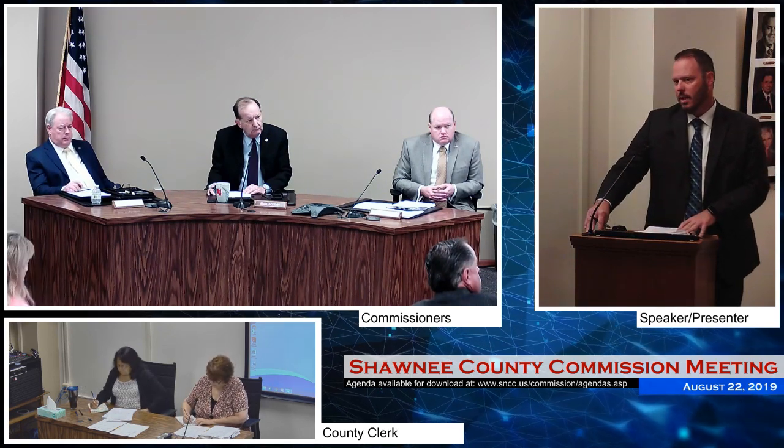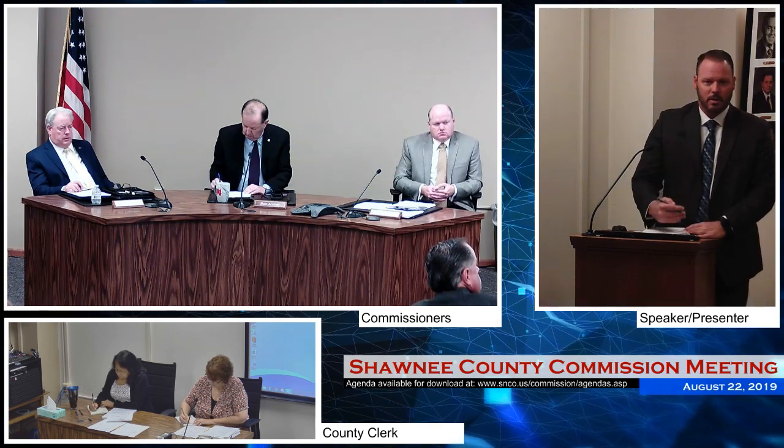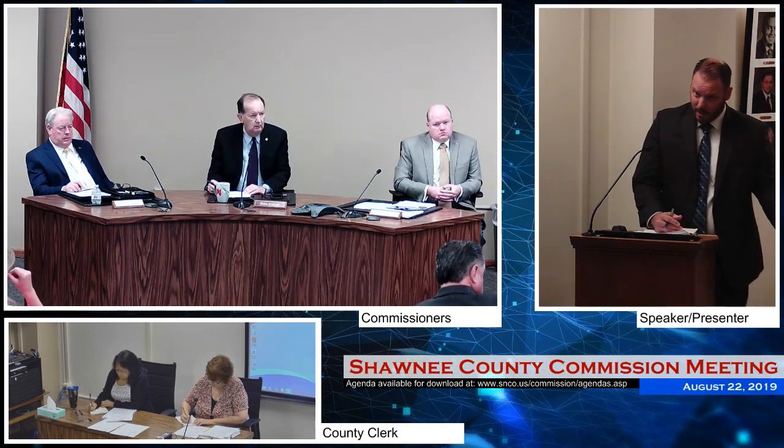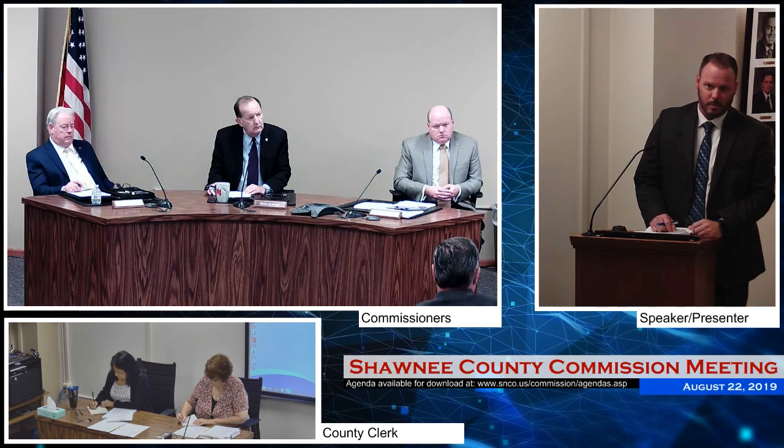Now, under state law, if we're going to use either design build or construction manager at risk, there's a specified process for how we proceed. This morning, we can discuss whether to use design build over the traditional method. If you decide to do that, you'll authorize county staff to publish a notice in the official county newspaper that we intend to use design build on this project. That'll be published for at least 15 days, and then we'll come back and have a public hearing on whether to move forward and issue an RFQ, a request for qualifications on this project.